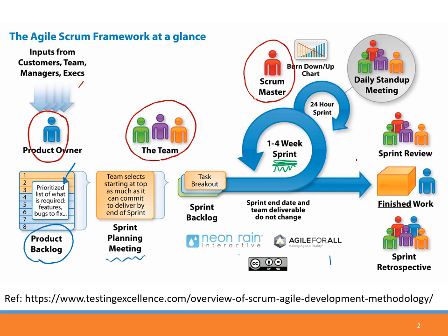That means everyone meets together in order to plan the sprint. For a sprint of 2 weeks, we all plan together what we are going to do within this 2-week sprint, how much work from the product backlog we can actually complete. So we select which tasks to do within the sprint, and of course, we should select the most important ones to be included in the list, definitely, right?